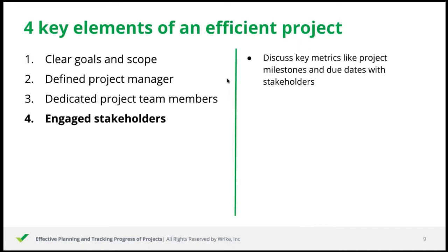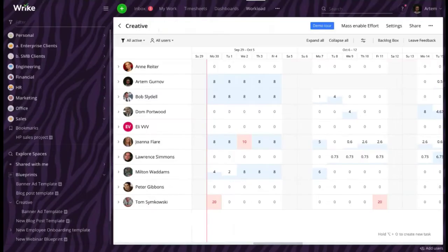One of the things we would like to stress here is the importance of converting key project steps into milestones. They are easily distinguishable from regular tasks on the Gantt chart, and you can also build a report that would only include data on these type of tasks.